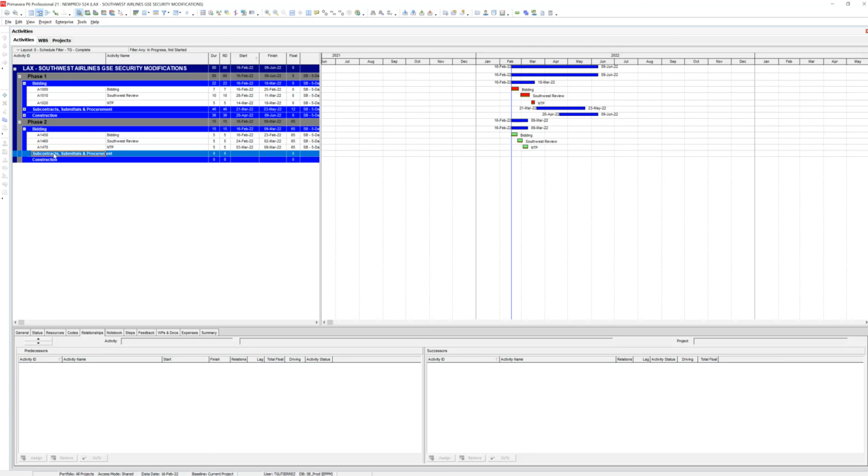So subcontracts, submittals and procurement, and this is where we're gonna go back to the things that I asked you to track, right? You should track, like you just heard Joseph say right now, our schedule may push because of procurement. It always pushes. So the more you try to track the items that you think are going to push, put them on the schedule, right?